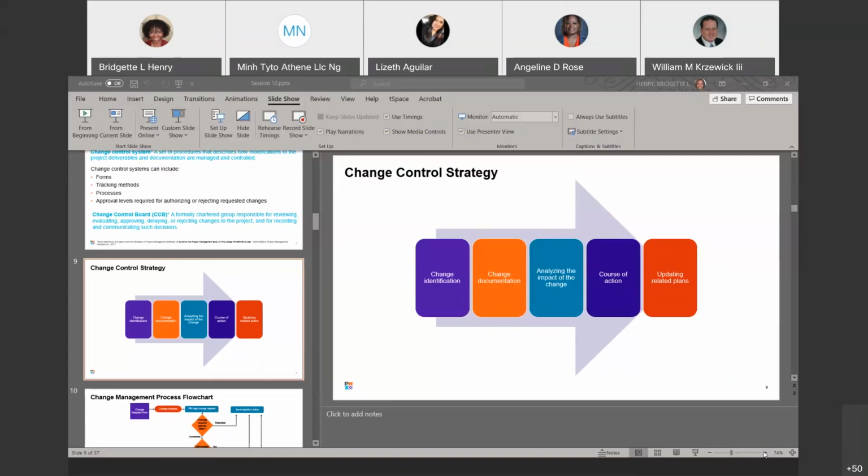I would say you're going to update the issues log, and then you could reevaluate the impact of the change, because if the delay isn't going to be as significant and they can start to work with the first batch, that might allow you to make some changes to that significant delay and make it so that it isn't delayed as much.